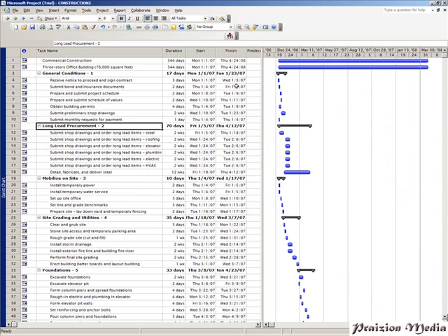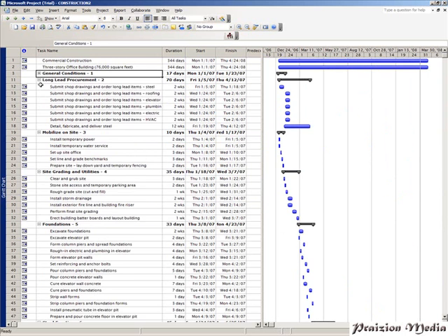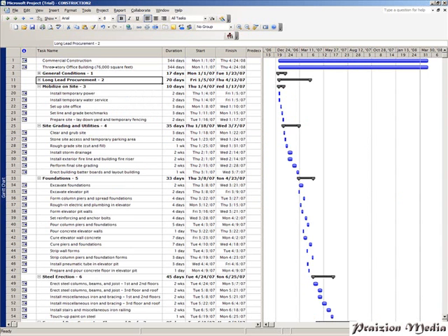So far, I've imported my schedule from Microsoft Excel into Microsoft Project. The next thing I want to do is indent all my tasks to make sure they roll up to these top tasks. The quickest way to do that will be to click on the Show button and click on Outline Level 1, and that shows me all my Level 1 activities.